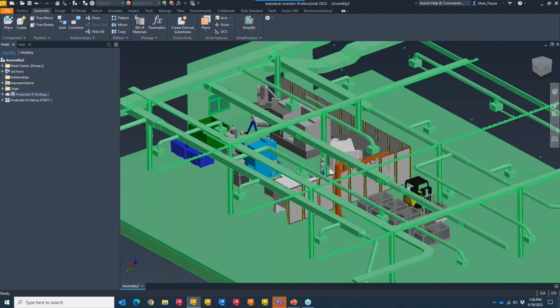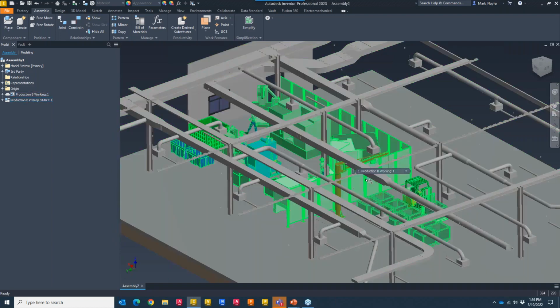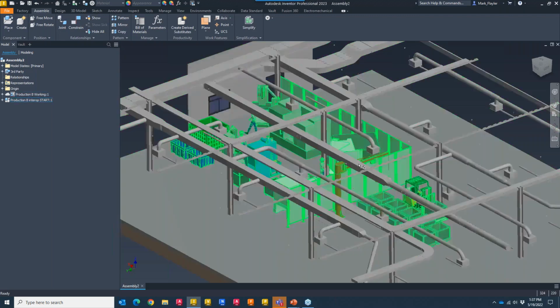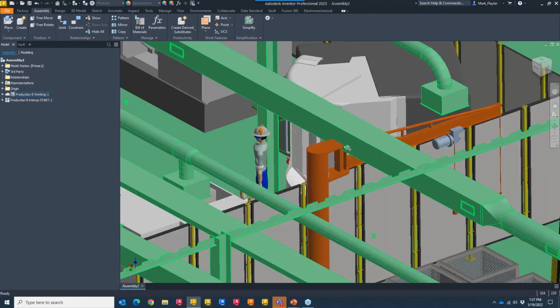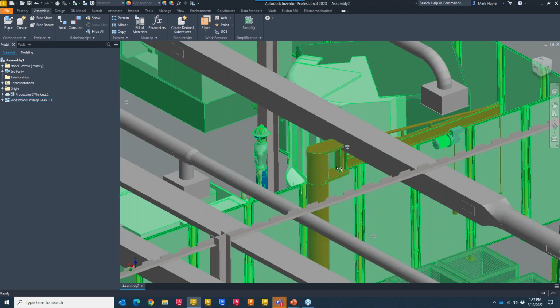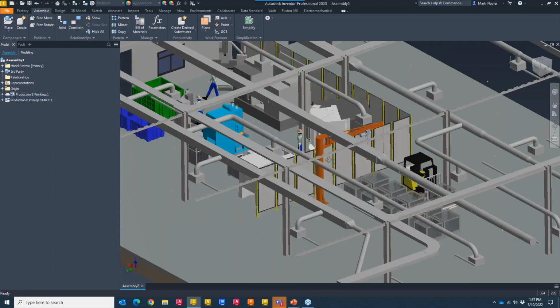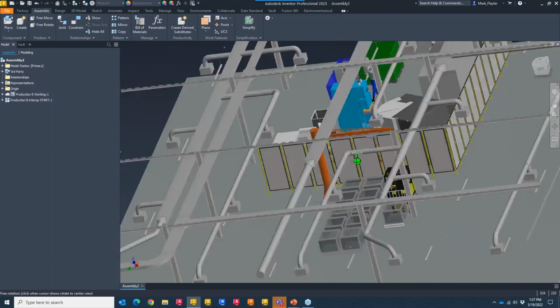Now, if you're given a 2D AutoCAD drawing, you're just kind of shown this stuff. You may not get heights on things. So having this sort of level of intelligence about a current brownfield or interacting with people who are doing greenfield design can be a very, very smooth enhancement to your process. Okay. Now, I have two decisions here. I can make my crane shorter, or I can go back to Brian and say, hey, can you move your duct? Because maybe this isn't built yet, right? But these are all things we can discuss now.